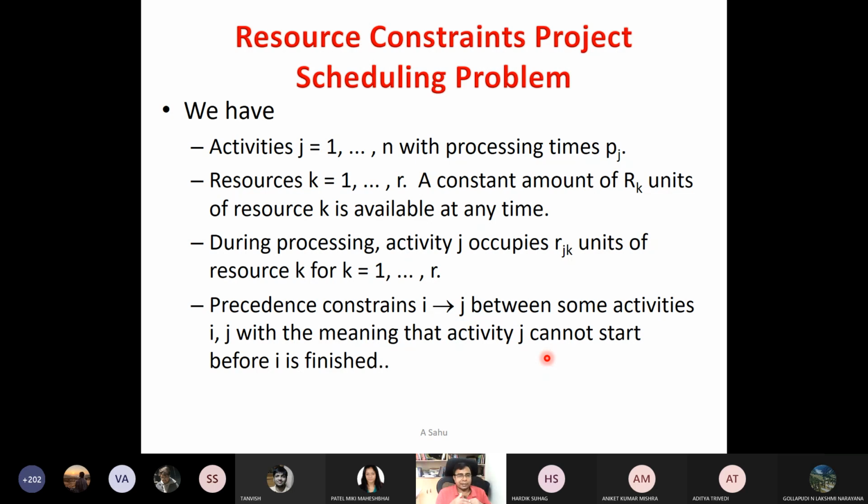And for a DAG, what sorting algorithm do we use from your algorithms course? Topological sort. Yes. So given a DAG, we can run topological sort on it. So all the nodes can be ordered from 0 to n. Suppose an n-node DAG, it can be ordered in a topological order, one after another. Only for a DAG can we do this. If it contains a cycle, then you cannot.